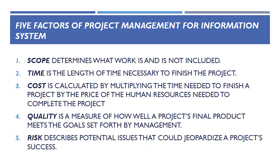Third is cost. Calculated by multiplying the time needed to finish the project by the price of the human resources needed to complete the project. The price of workspace, software, and hardware are all included in the cost of an information systems project. The project's budget is created by project management and ongoing project costs are tracked.